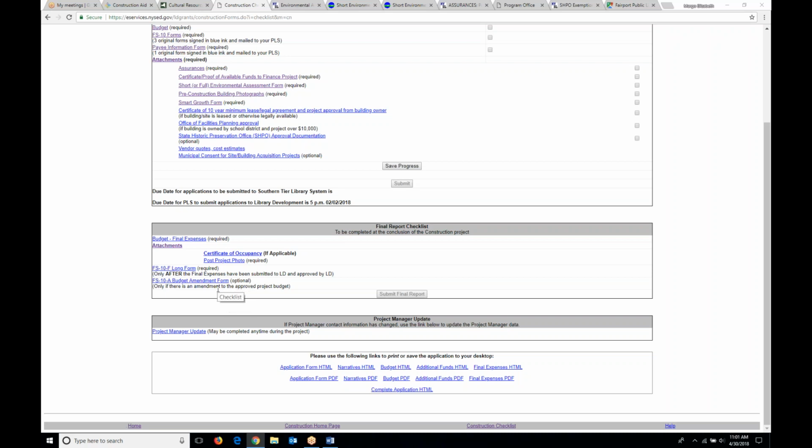Usually this is when we applied for $50,000. When we actually did the work, it ended up only costing $30,000. And so we added a sidewalk paving project to the project and that took up the additional $20,000. That kind of thing happens.